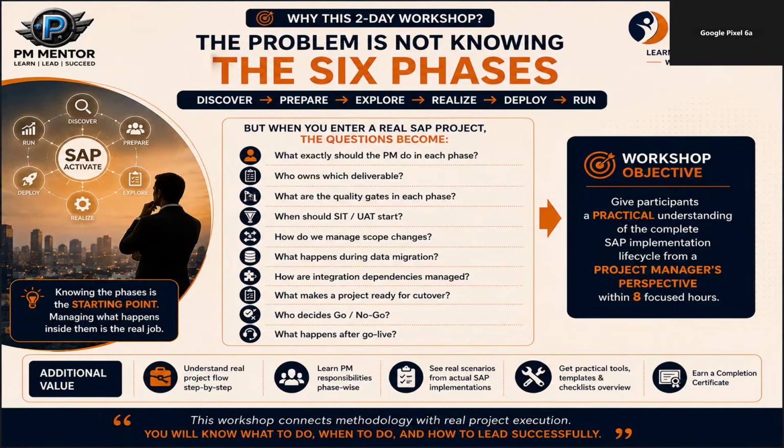So the project manager needs to understand: is this really a gap? Is this mandatory? Is there a standard SAP alternative? What is the business justification? What is the cost impact? What is the schedule impact? Who will approve it? And should it be part of the current release or move to a future phase?